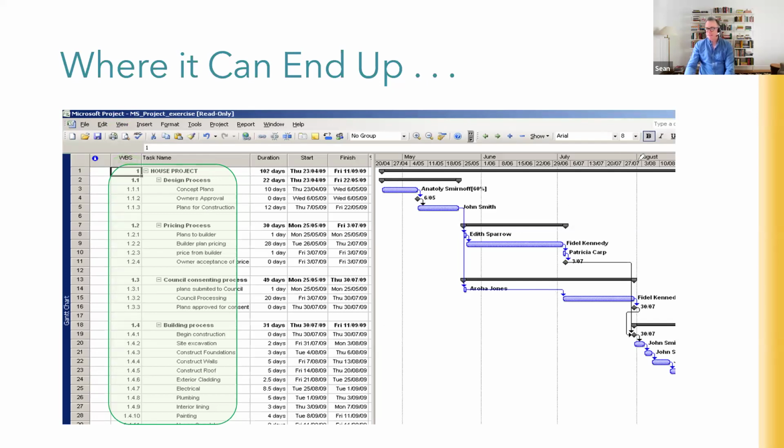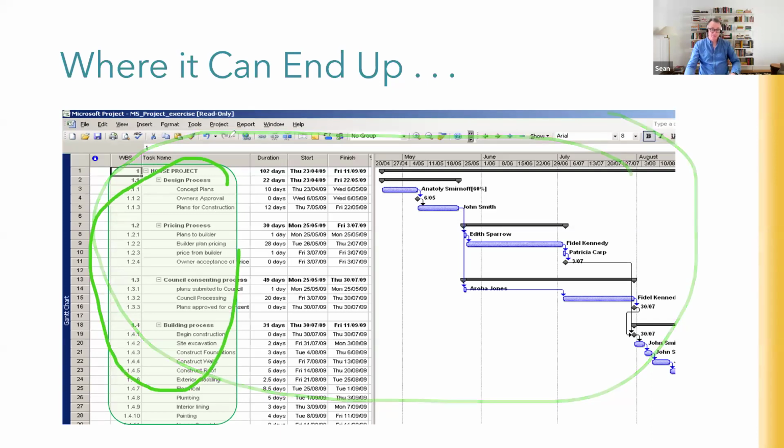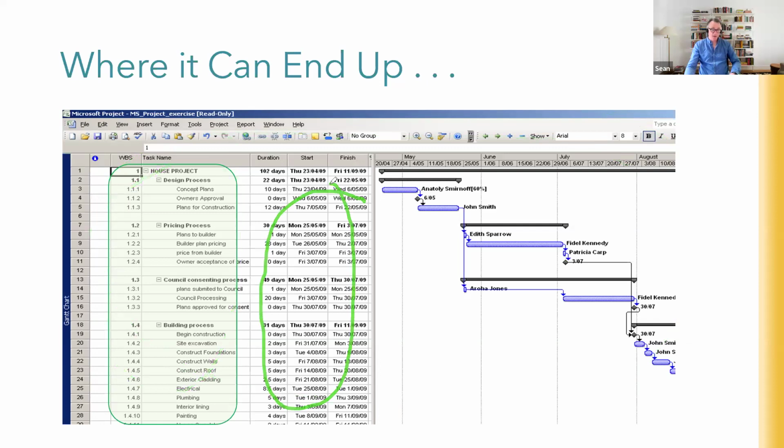I've often said, just as an aside, and I'll repeat this in the module on scheduling, that the Gantt chart here is simply a combination of the work breakdown structure and the network diagram. That's all it is. And the inventor of the Gantt chart, Mr. Gantt, Henry Gantt, I imagine one day was frustrated with having to do a network diagram and a work breakdown structure, and simply said there's got to be a better way to do this. So this Gantt chart is just a combination of the work breakdown structure information here, the information that you'd find in a network diagram about dependencies and durations, and then it gets turned into a Gantt chart here. So that's what you need there. That's an essential use of the WBS in order to do a project schedule.